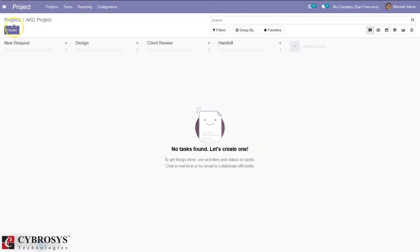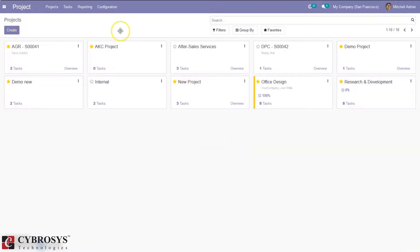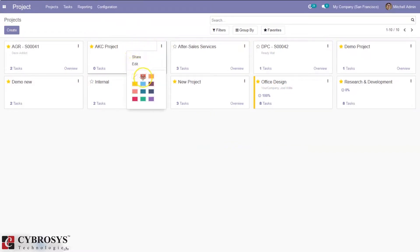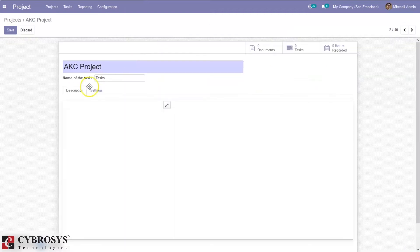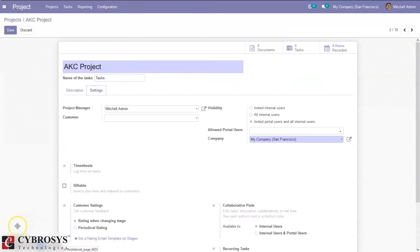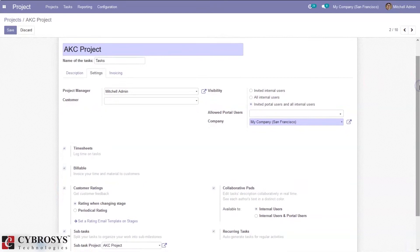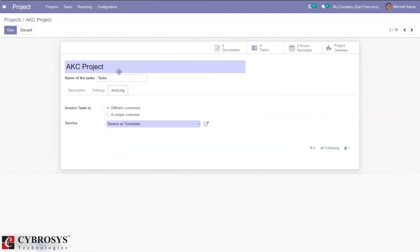After adding stages, you can create tasks directly from here. Click on the three dots of the project and you can see the color option. When you edit the project under settings, you can enable the option 'Billable'. This is really important because it is used to invoice your time and material to customers.